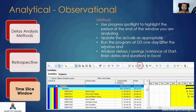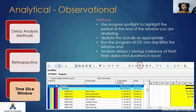You take the highlighted activities and go into Excel, showing the variance start date, variance finish date, and variance duration. There are multiple scenarios: the contractor started earlier than planned but finished late; or started late but finished on time; or started late and finished late. We have to account for all possible scenarios. For me, a delay occurs when the finish date is violated — if the actual finish is beyond the planned finish date, it is a delay by common sense.